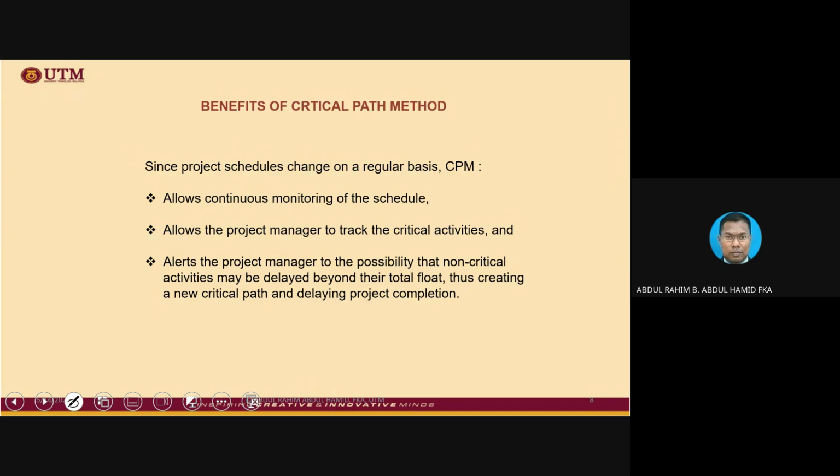If we know such activities are very tight, meaning they do not have much free float, we need to be very careful not to delay such activities a lot, because at the end of the day, it will create another critical path.